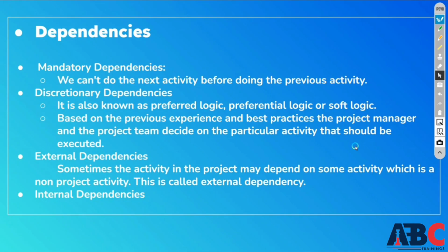So a discretionary dependency is the same logic you have used previously. Though there are different projects, in a previous project you have done the same work. So according to that experience, in the next project you will see when you have to execute that activity.